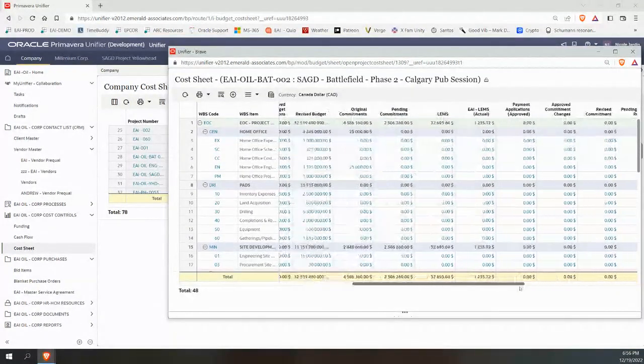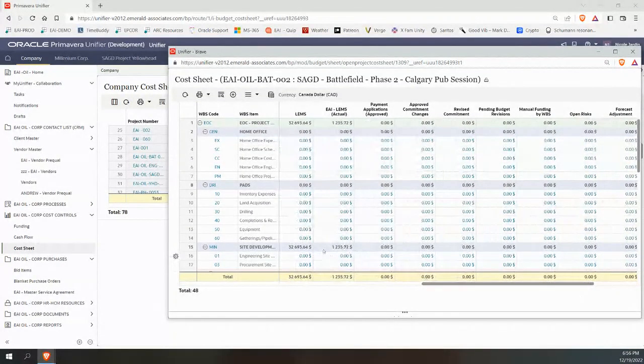As we start to execute on the project, we might start to track our labor, equipment, and materials charges to date in daily diaries, or what I'm calling here a LEM, which is labor, equipment, materials, subcontractor. Okay, so that could also be equated to an accrual.